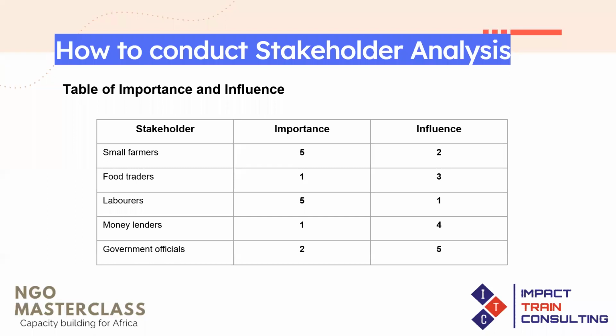So in terms of importance, importance are the people or group of people who are going to benefit directly from the project, while the influence is people who can sway public opinion, who can tilt perception about your project either positively or negatively. This importance influence table is similar to the Venn diagram we talked about in project management, and you're using circles to determine stakeholders, and the size of the circle shows you the relative power or influence